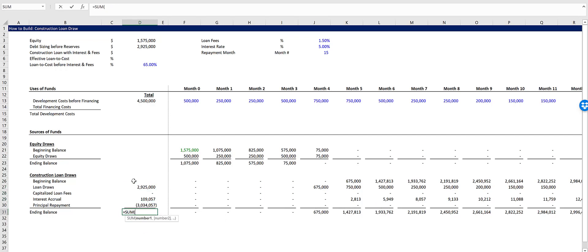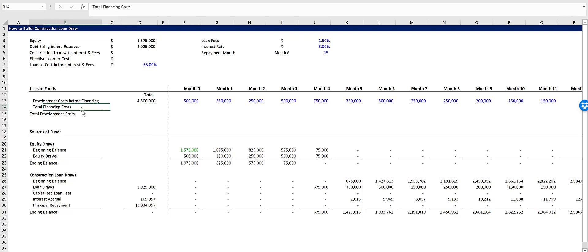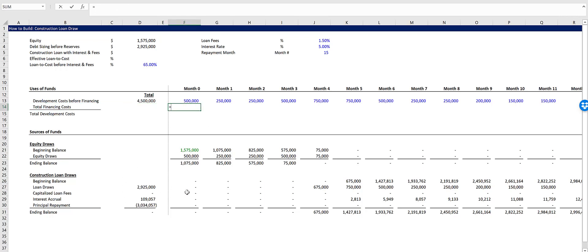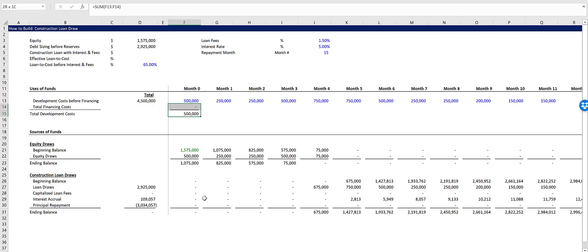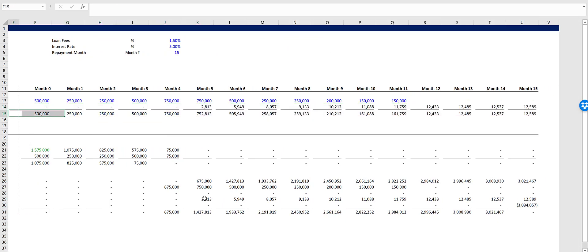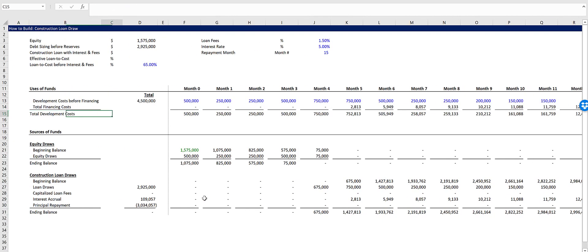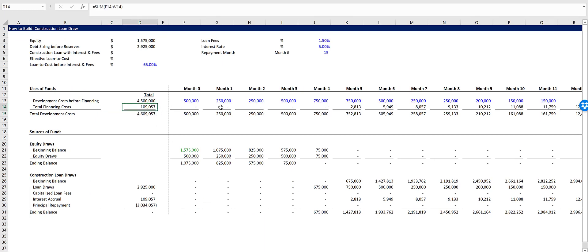We could sum all this up and we'll see it equals zero. So let's go up here. Actually, let's go to total financing costs first. And let's add this up. Our total financing costs, capitalized loan fees in each period plus our interest accrual. And then our total development costs will be the sum of the development costs before financing and the total financing costs. We'll copy that across. And then we can sum these up. So we have $109,000 right now, not including our capitalized loan fees yet.